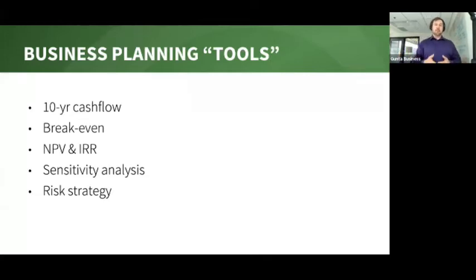So that makes it obvious, at least at this level, that once you're able to get to this point, you can start to compare projects. If we heated this versus that, or if we got 25% funding versus none at all, how does that affect the business case? What does that mean for us as owners who have to carry the risk and responsibility of these units? Then we mess around with sensitivity analysis. I already discussed this a bit, where you're looking at what happens to price impacts to the feedstock or the alternative feedstock.